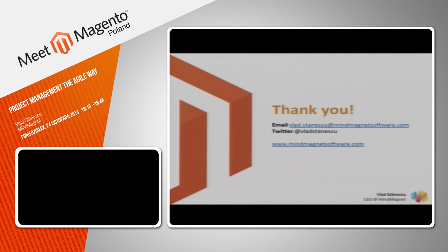Okay. So depends from a project to another. We always like to involve the person who would do the QA on the project. We would involve him in the team. If his workflow would be only concentrated towards the end of the sprint, he might attend or not attend the meetings, but he would be a person who is well aware of the projects, the requirements, and if he's budgeted inside the projects, inside the sprint, he would have a day allocated for his testing, which would probably happen before the demo to the client in order to evaluate the testing.